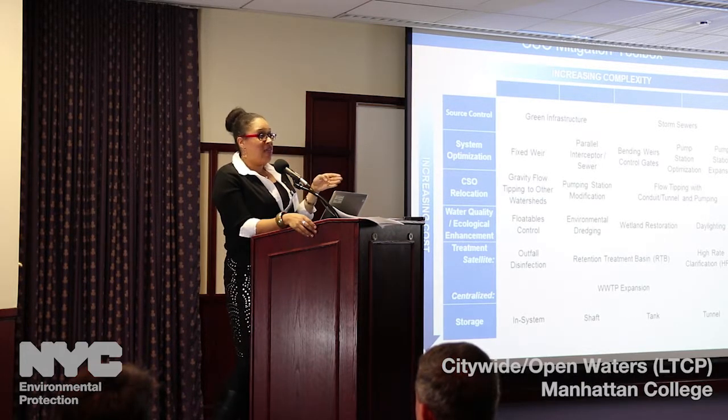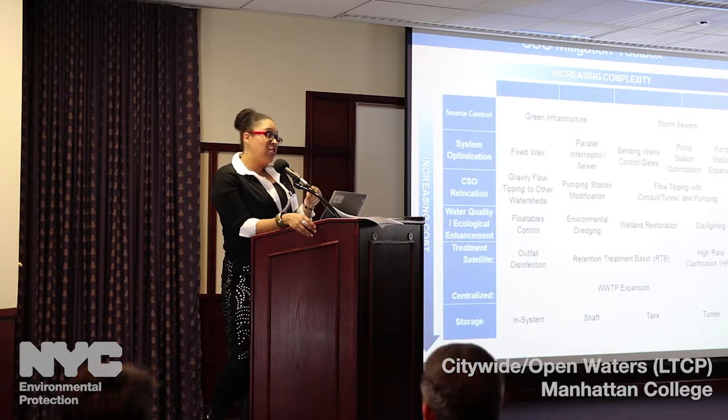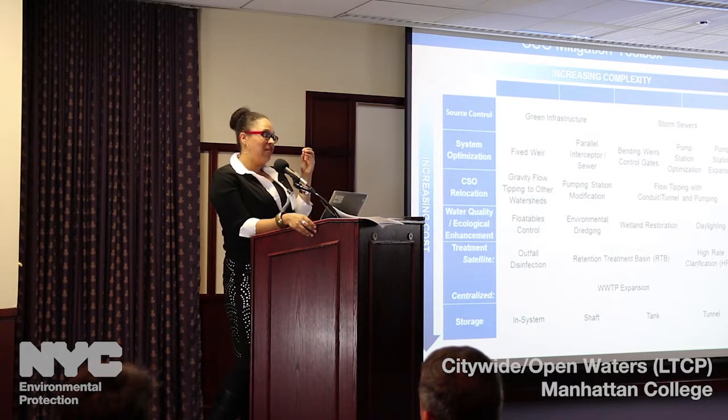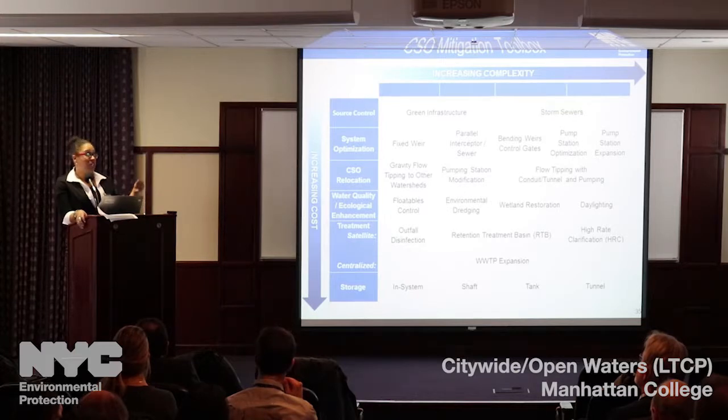But you're right in that the way we prioritized the green infrastructure was for the specific tributaries and water bodies where we thought that we would have the most impact, to the gentleman's earlier question about where's the bang for your buck and where do you see the benefits of the GI from a volume perspective. We did prioritize those water bodies. And so that's why you don't see a rain garden contract area for the Harlem River the way you saw for Bronx River or Westchester Creek or Hutchinson. So that does not mean that we're not prioritizing green infrastructure, particularly in East River and open waters.